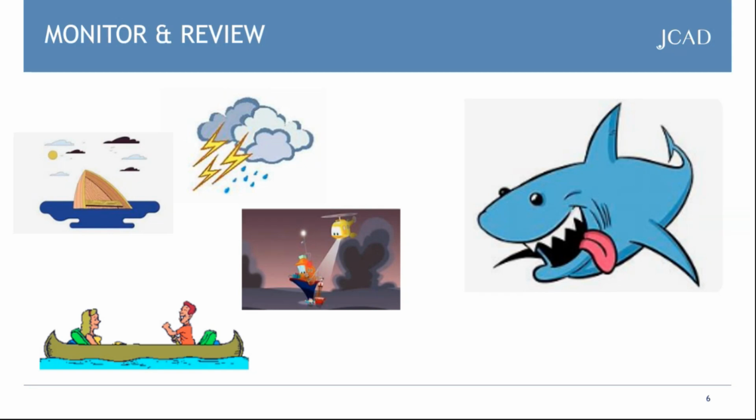And if you're aware of things changing and risks needing to be updated, then you should, of course, review and update individual risks more frequently than required. So if your organisation says all high red risks are reviewed every 3 months, but you've got a risk that you really think needs to be looked at, there's no reason why you can't look at it within those 3 months and check it more often. And this will help to ensure that you're adjusting your responses as circumstances change, which will ultimately help you in achieving those objectives.